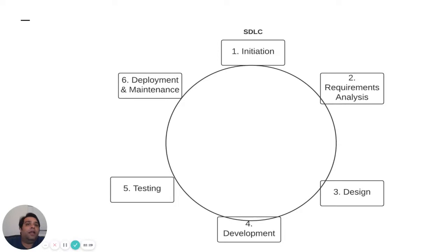Create the implementation backout plan to assist the project manager and monitor implementation effectively. It is the plan of action needed if the associated change or release fails. So whenever they are releasing something and everything is failing, there should be a backup plan ready. If something goes south, then you have to refactor or go back to the previous state wherever the application is working.